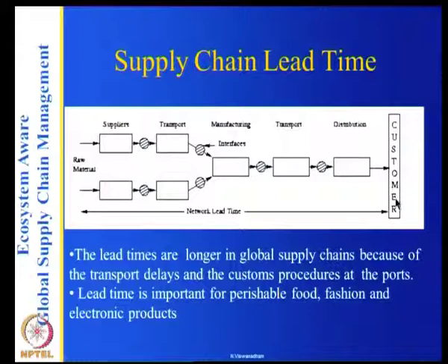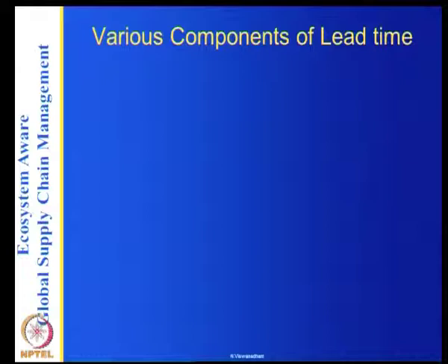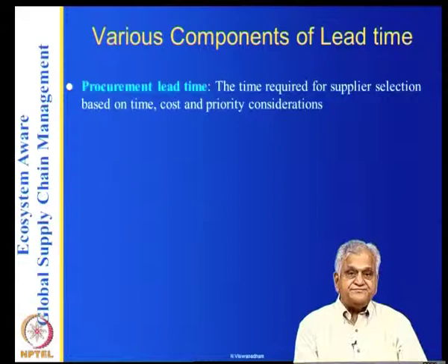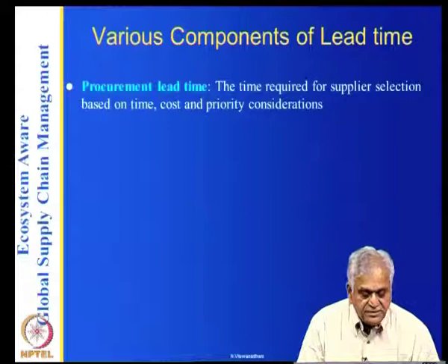So, but it is important to note that lead time is a very, very important measure, and one has to carefully measure and minimize the lead time. So, if you want to get the components of this, what are the components of the lead time? One is procurement lead time. That is the time that is required for the supplier selection based on time, cost and priority considerations.